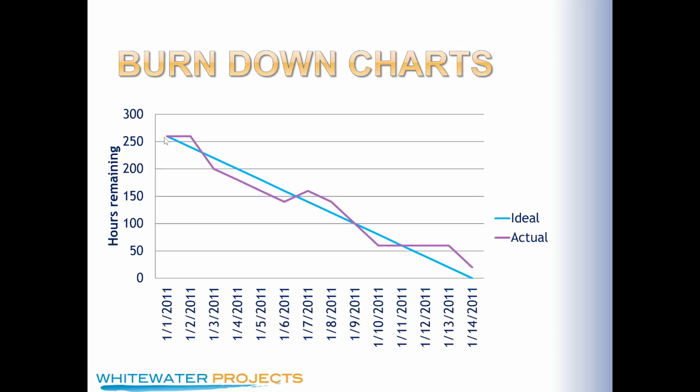No, it's the truth. That's really what we want to know. We want empirical proof and evidence of what is accurate. We don't want you to give us what you think we want to hear, right? What we want to hear is the truth. So next day you work on it for 4 hours and it's done. You move it out of that column and you're done, right? You move it to done and it's done.